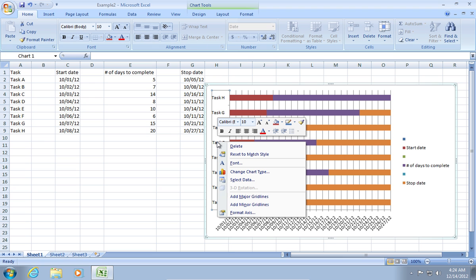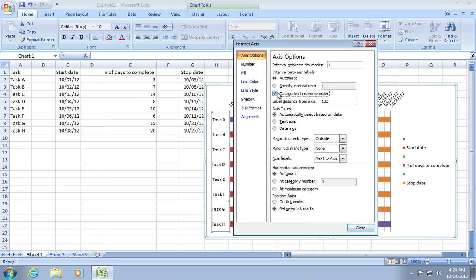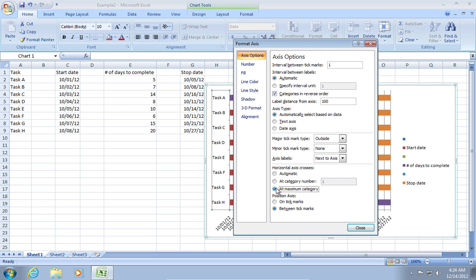Right-click on Left Axes title and choose Format Axes. In the appeared window, check Categories in reverse order in the Axes Options tab. Also, set Horizontal Axes Crosses to At Maximum category.